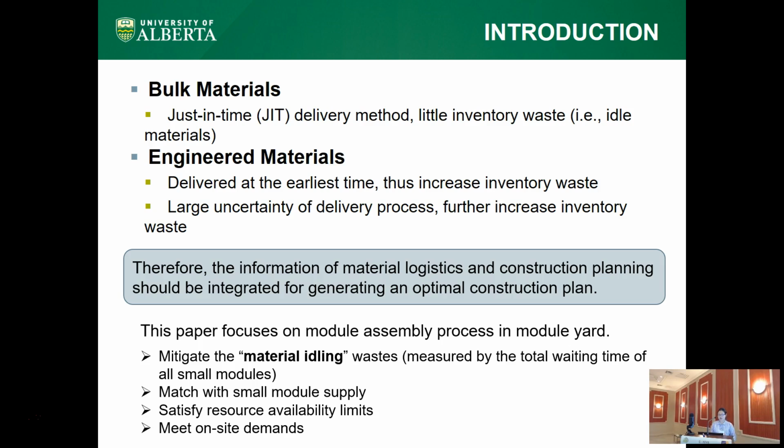This paper focuses on the module assembly process in the module yard because it is a middle stage between the module supply and the on-site installation. The optimal assembly plan needs to mitigate the material idling waste, here measured by the total waiting time of overseas small modules. The plan also needs to match the small module supply, satisfy resource availability limits, and meet on-site demands.